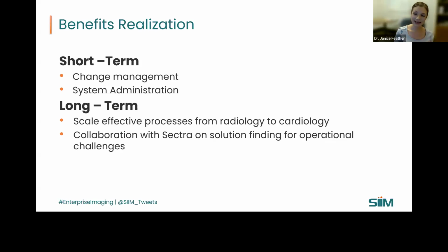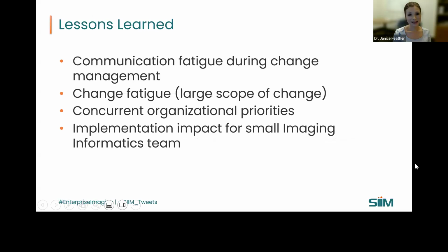And then lending itself to the next slide, I think one of the things that we might do differently if we were to do this again, or if we could advise you, depending on where you're at with your journey through this work, is really looking at the importance of that first experience with the solution. And the first experience of the solution being in a demo environment, not during a go live. Unfortunately, Niagara Health had a recent experience of a large solution that we didn't really see fully until the day they turned it on, and it wasn't great from change management.